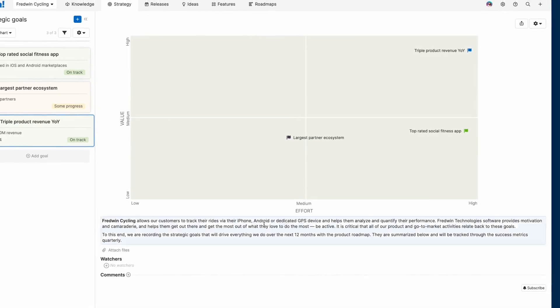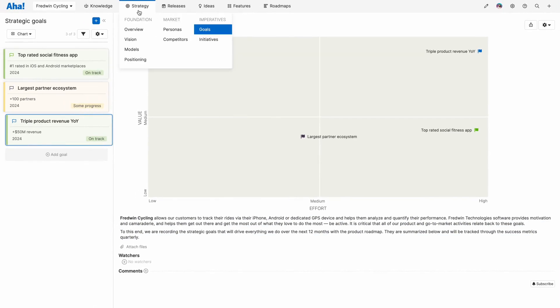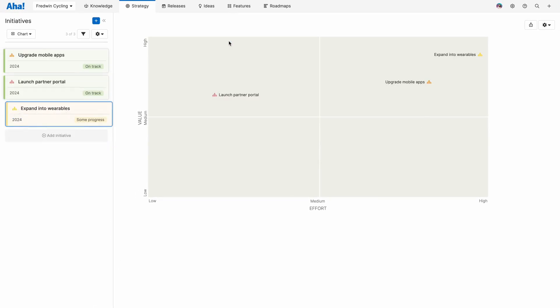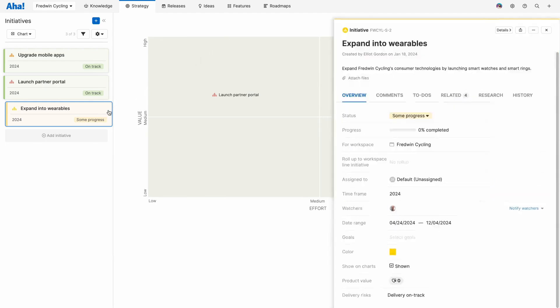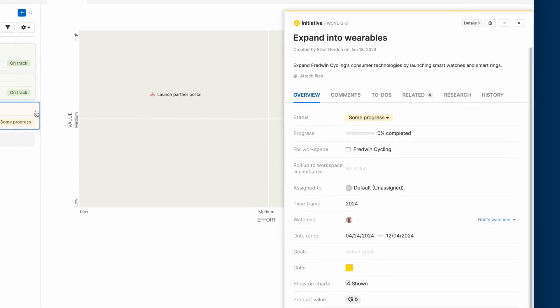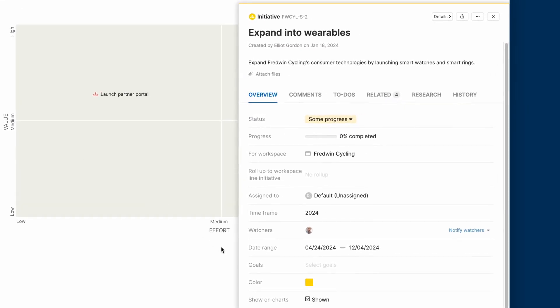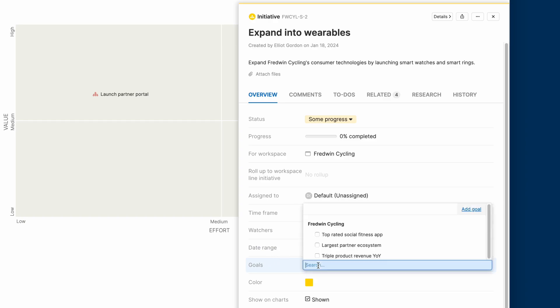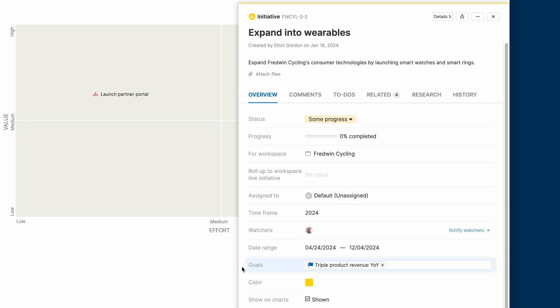Once you have added your goals, the next step is to capture strategic initiatives or those big themes of work that will help you achieve them. Give each initiative a name and set the timeframe for completion. Make sure you tie each initiative to one or more goals to show how it supports your overall strategy.